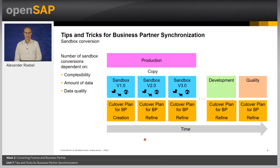Usually, we have to take care of two types of sandbox systems. There are sandboxes for business partner synchronization and CVI only — for example, to check the result of full data cleansing activities. The other type of sandbox is for S4HANA conversion. The individual project decision determines whether you require both types of sandboxes or merge both activities from the first sandbox onwards.